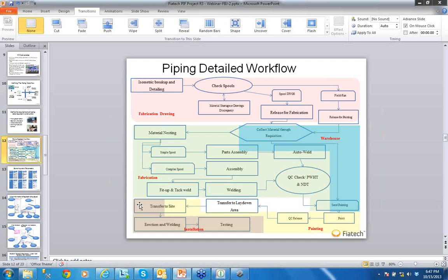the only way for me to trace it is via this electronic data management system transmittal or submittal, because the date of this one will dictate whether this was issued for construction or not, can I use it or not. Now, as you notice, we have files, and as long as those files are there, whether you have one office or 10 offices, we rely on the electronic data management system to take care of this. We read the file, we generate the file, but transmitting those files so that they become useful to somebody else, they should be attached to a certain transmittal.